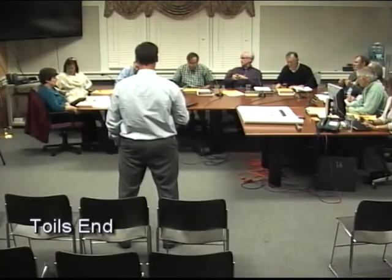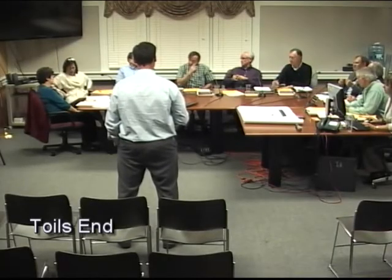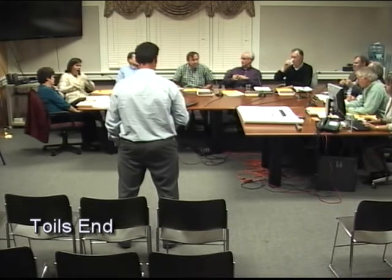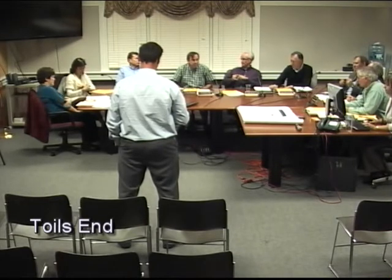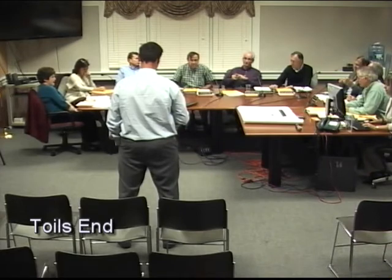The commission did vote last night to withhold all new building permits until our next meeting, until the drainage report is produced and agreed upon. And then it'll be a matter of what has to be done and what not before we move forward again. So hopefully we get the drainage study pretty quickly, right?